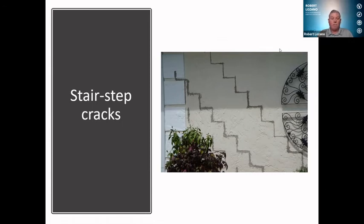In Coral Gables, but almost all counties, prior to issuing a permit, will be requesting an asbestos survey. So that is definitely an important aspect and something that should be factored in before any renovation or repairing commences. So yeah, Rudy, very, very good point. It is still out there and it is relevant, and that's why we're here.